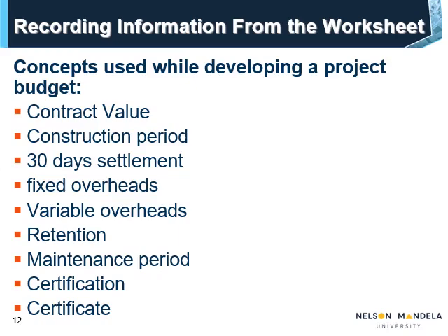30 days settlement, this is a result of an agreement between the contractor and a supplier, by which the contractor is allowed to buy on credit, and accumulate credit for 1 month, after which the debt accumulated for that month will only fall due 30 days after the end of that month. This means payment for products or services delivered is delayed by 30 days. Thus, the contractor has 30 days to pay before interest is charged. Agreements can also be reached for periods of 60 days or more.